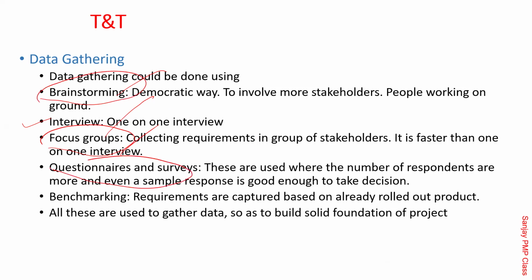Some requirements also could be captured better using questionnaires and surveys. Maybe you want to capture views, how should the screen look, from 1,000 users? Now with 1,000 users, you can't do interviews. With 1,000 users, doing even brainstorming is very difficult. So for questionnaires and surveys, create a Google form, send a link and expect their answers. Remember, one of the problems of questionnaires and surveys is that response is always limited. Sometimes only 10% of people respond. So you need to decide where to use it.